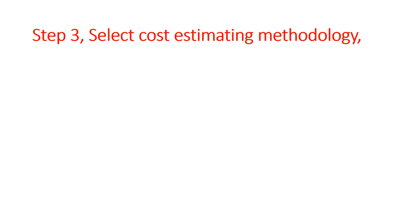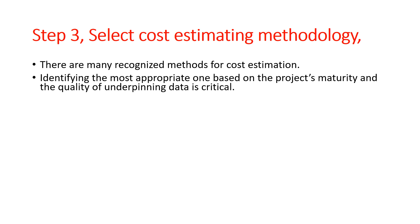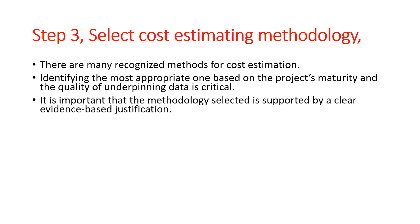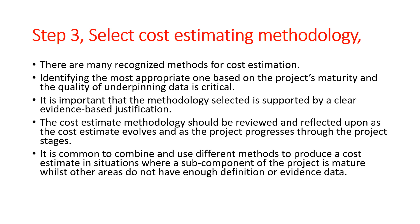Step 3: Select Cost Estimating Methodology. There are many recognized methods for cost estimation. Identifying the most appropriate one based on the project's maturity and the quality of underpinning data is critical. It is important that the methodology selected is supported by a clear evidence-based justification. The cost estimate methodology should be reviewed and reflected upon as the cost estimate evolves and as the project progresses through the project stages. It is common to combine and use different methods to produce a cost estimate in situations where a sub-component of the project is mature whilst other areas do not have enough definition or evidence.